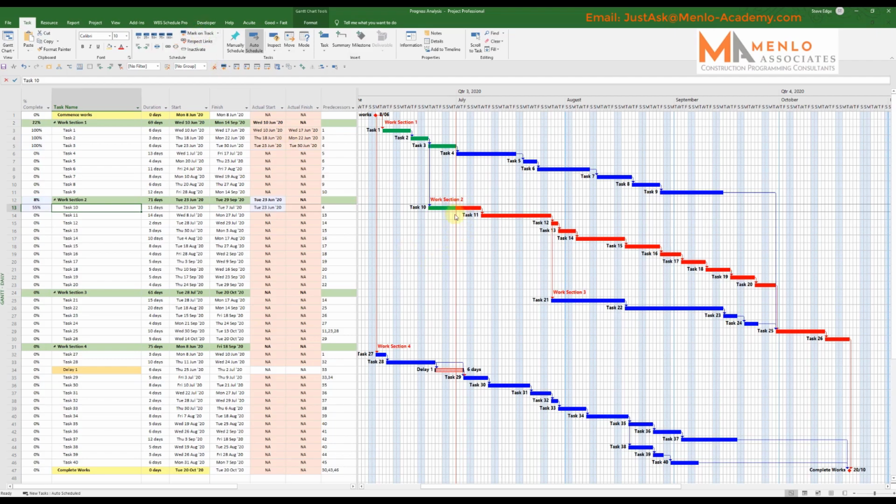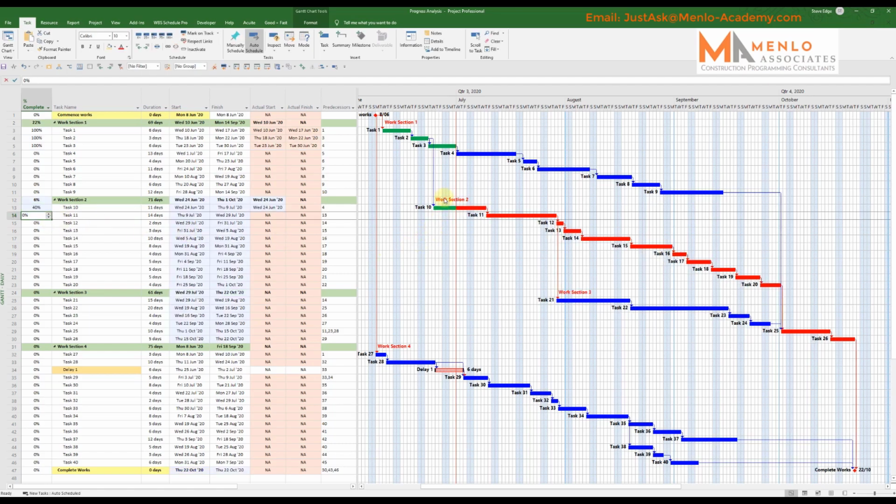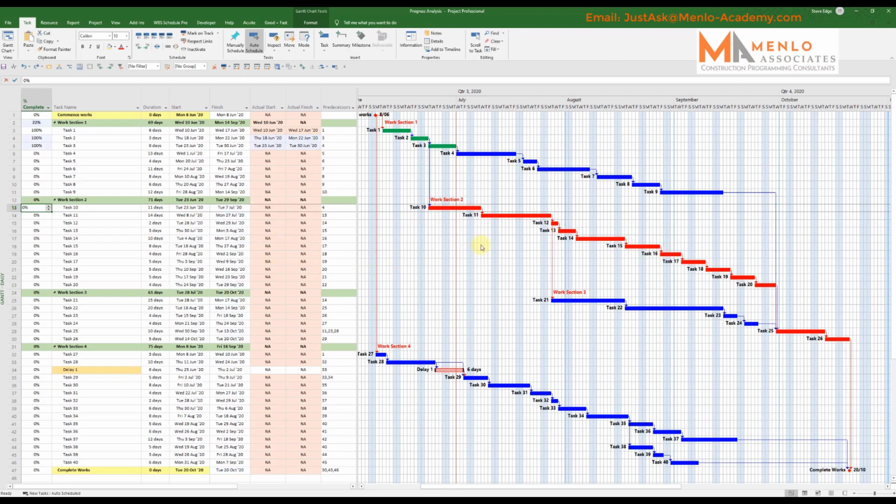so it updates to there, so where we are here. Now that's saying it's 55%. Let's just look at the changes that it makes. If, say, instead of being 50%, it's at 40%, I can either type in 40 or I can literally click to choose. So if I say 40% and click OK, you see it adjusted, it moved it over slightly to allow for the fact that it's running a bit later.